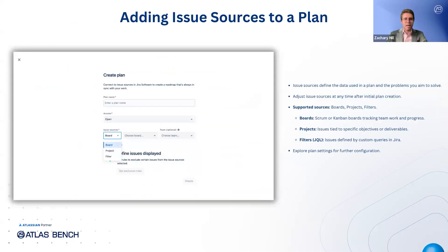When creating or refining a plan, you start by choosing where your data will come from — these are called issue sources. By defining the issue sources, you're essentially selecting the set of issues that will guide your planning efforts. You can pick boards, projects, or filters. Boards, whether Scrum or Kanban, map out team workloads and progress. Projects focus on a specific product or feature, making it easy to visualize related work. And filters, driven by JIRA's powerful query language JQL, let you build a custom set of issues based on any criteria you choose.